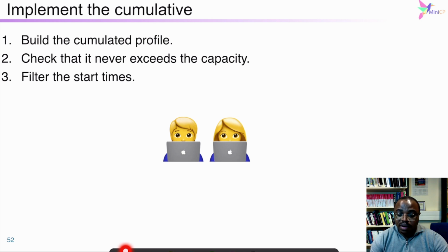We can sweep over the timeline of events and update the start times of activities. Be careful when the corresponding activity contributes to the profile. Also, apply the mirror filtering to avoid code duplication and prune the latest completion time of activities.